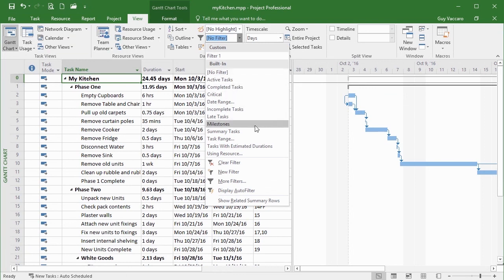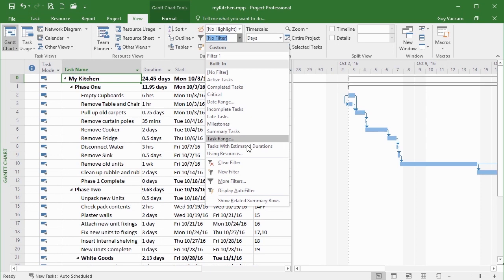The predefined filters are very useful for extracting, hiding, and showing only those tasks that meet a set criteria — they might be critical, a particular date range, tasks left to be done, or all completed tasks. Tasks with estimated durations are also useful: if you've been putting odd question marks in while building your project, you can filter those out and revisit them to give a more accurate time. Once we get on to resourcing, we could also filter by a particular individual or resource. That's sorting and filtering covered.